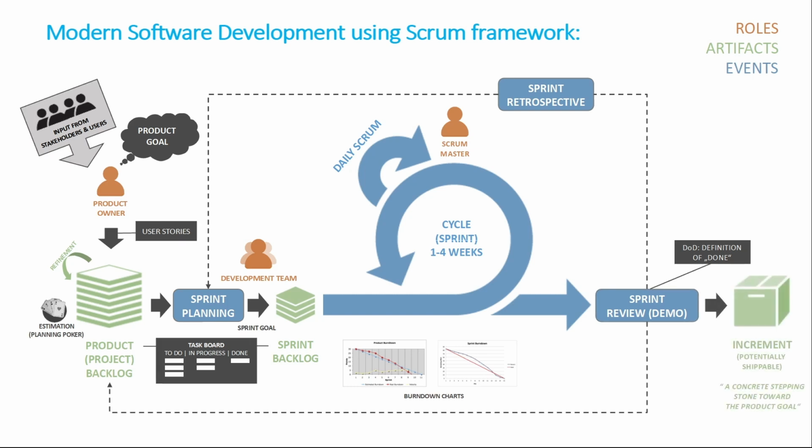Each sprint produces a clear output in the form of an increment, which serves as a tangible step toward achieving the product goal. Every increment builds upon the previous ones and is thoroughly verified to ensure that all increments work seamlessly together. For an increment to deliver value, it must be usable. Multiple increments can also be created within a single sprint. The collective sum of these increments is presented at the sprint review, supporting an empirical approach. However, an increment can be delivered to stakeholders before the sprint ends. The sprint review should never be seen as a barrier to releasing value.